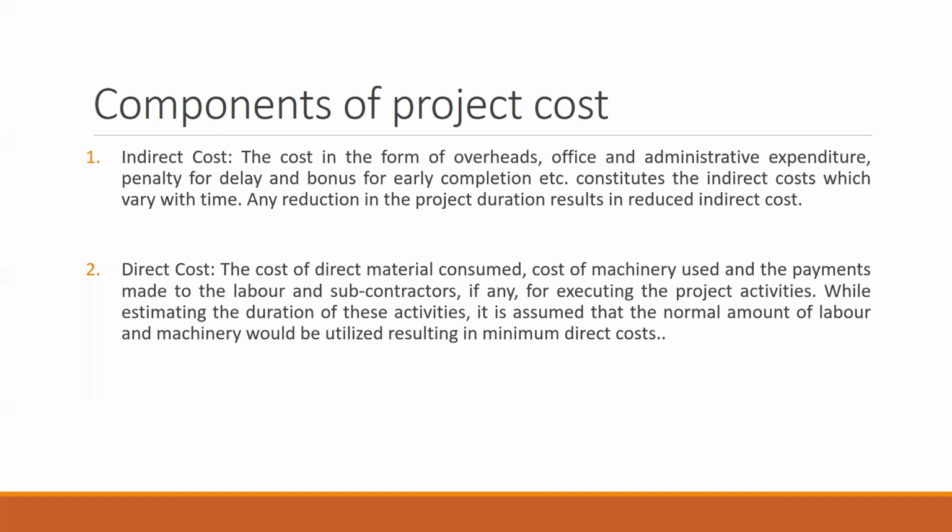If there is less productivity or insufficient functioning of my labor, then the work might get dragged and might not get completed in the given duration, depending on the critical path and the critical duration. So even in that case, my direct cost can increase.